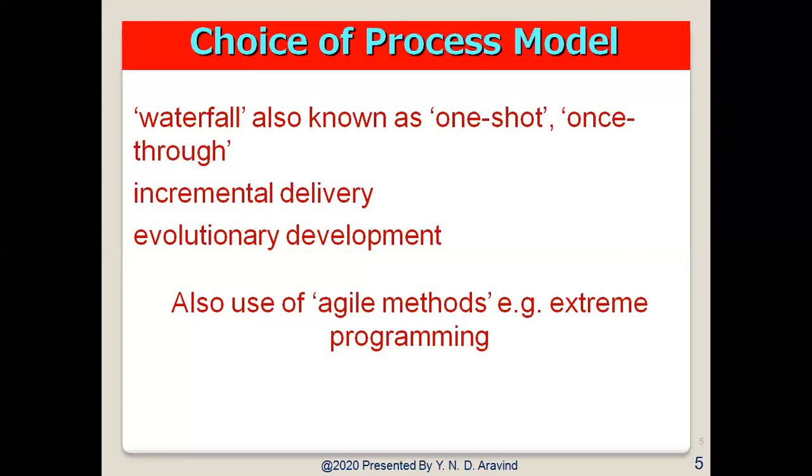So we need to complete each and every phase. This type of software development model is basically used for projects which are small and have no uncertain requirements. At the end of each phase, a review takes place to determine if the project is on the right path, or whether to continue or to discard the project.